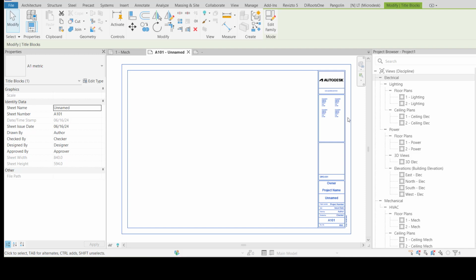Now after that we will create all the required parameters. I showed you one example, but maybe in your project there will be 100 or 200 parameters, depending on the EIR. So if you go deeper into which project parameters you need to create, you have to follow the EIR or some BIM standards, for example ISO 19650, or your company standards, whatever is there.